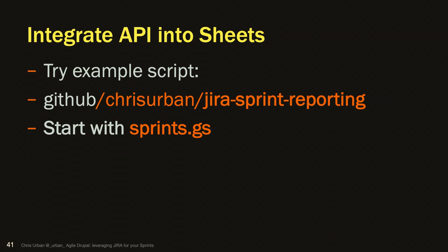Let's say you have a shopping list of 50 tickets that have to get done for this project. You want one filter that shows the current status, but they don't have access to Jira. So how do you do that? You can build a Google Sheet, and every time you load it, it'll query Jira and get the latest status. So you're done. Because that is often the case, that you have one or the other.